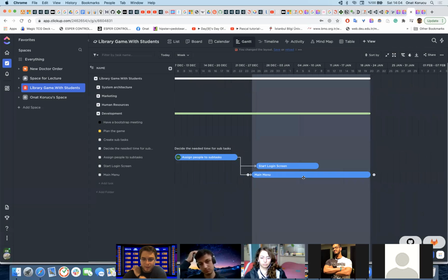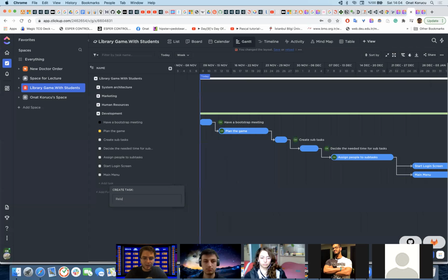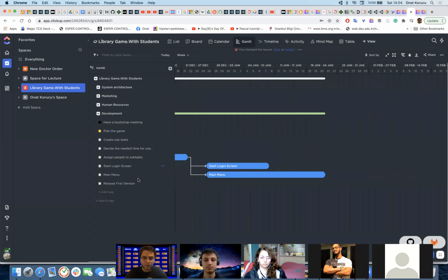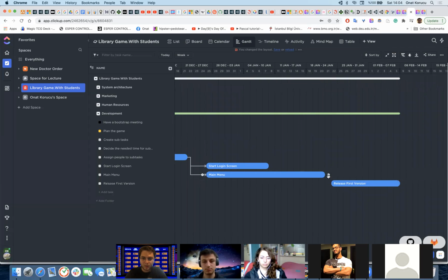And I'm going to add another task actually, which will be releasing the first version. And now I'm going to edit here. And now to release the first version, we will need a login screen and main menu. So we need to add 2 dependencies. Okay.